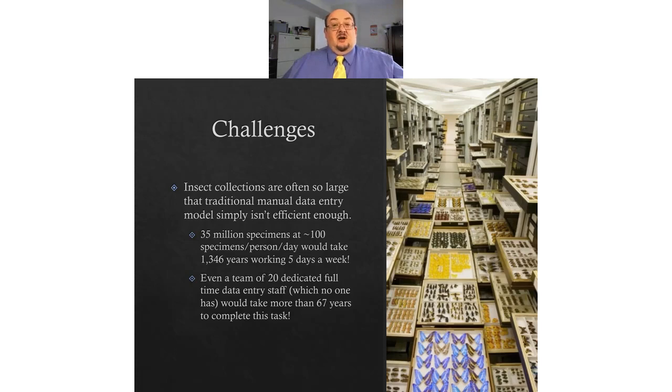Insect collections are also incredibly large. As many of you probably know, insect collections offer the biggest bang for your buck in terms of the amount of material and the amount of data trapped in the collection. And so many of them are just too large to employ a traditional manual data entry model. Just using our own collection as an example, 35 million specimens at roughly 100 specimens per person per day would take 1,346 years working 5 days a week, which obviously is not a great way to go about it. Even if you increased it by a factor of 20, it would still take 67 years to do a collection the size of ours with a manual data entry model.